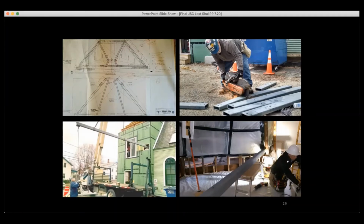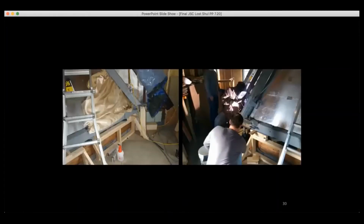Metal beams were cut to size on site. A 23-foot beam that extended across the front of the mural had to be threaded into place through a window cut in the wall. Although attempts were made to limit welding to off-site and bolt the structure together around the mural, that proved much too complicated. So welding was performed on-site using protective blankets and a special fire watch during and after each welding session. Any use of flames anywhere near a historic structure is not good, but this is the only thing we could do.